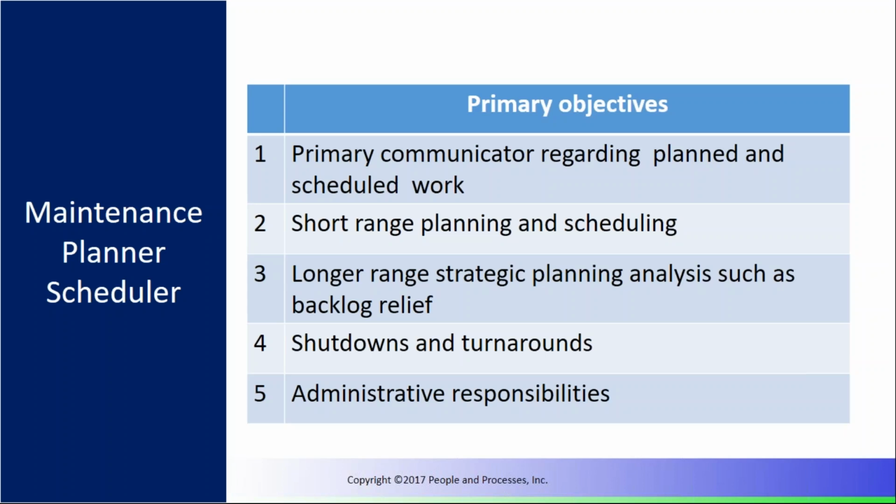And let me share something with you about this too, because I see this happen as well. Once we put out the schedule for next week, as an example, and it goes out maybe at Friday at noon, we've locked the schedule at that point. Anything that comes in after that, anything that happens in that current week regarding that schedule, that's managed by the maintenance supervisor, not the scheduler.